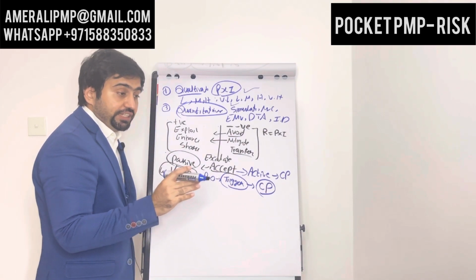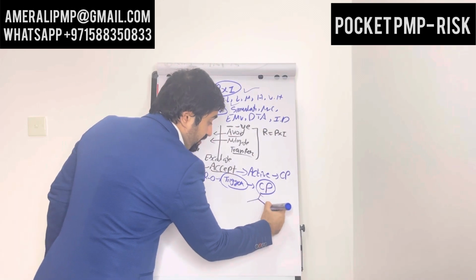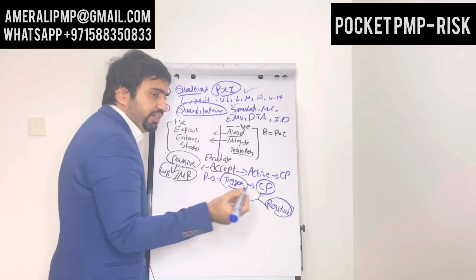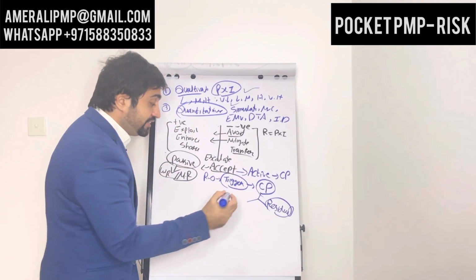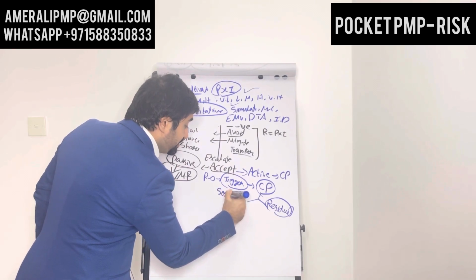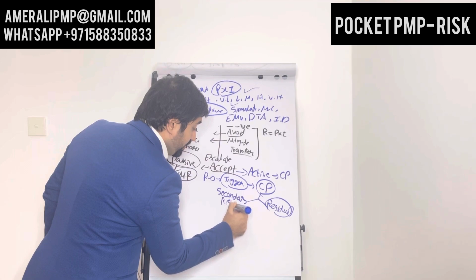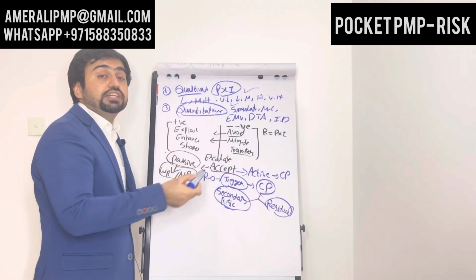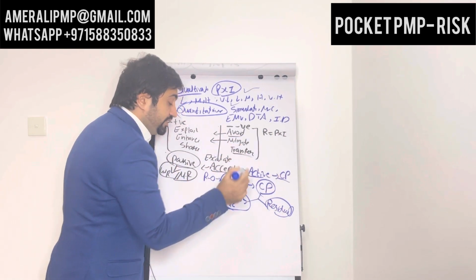If the plan is successful, good. You can have two options. Either you have residual risk, the minimum risk, which is accepted. You say, okay, this is accepted, we don't have to take action for every single risk. Or a secondary risk, maybe another risk you identify. Then you plan for the secondary risk as you did for the primary risk. This was for active contingency plan.